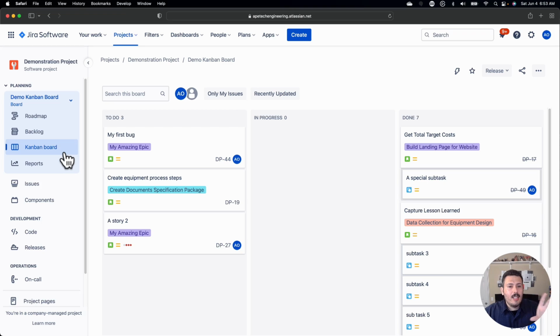So now you can see that these boards start behaving very similarly. So now we're at the question as to, which one's the right one for you then? My recommendation is, if you're completely new to Agile, I recommend you come in through the Kanban route. As you can see, I can configure Kanbans to look and feel very much like a Scrum board without the commitment of the story points, without the time boxing of your sprints.